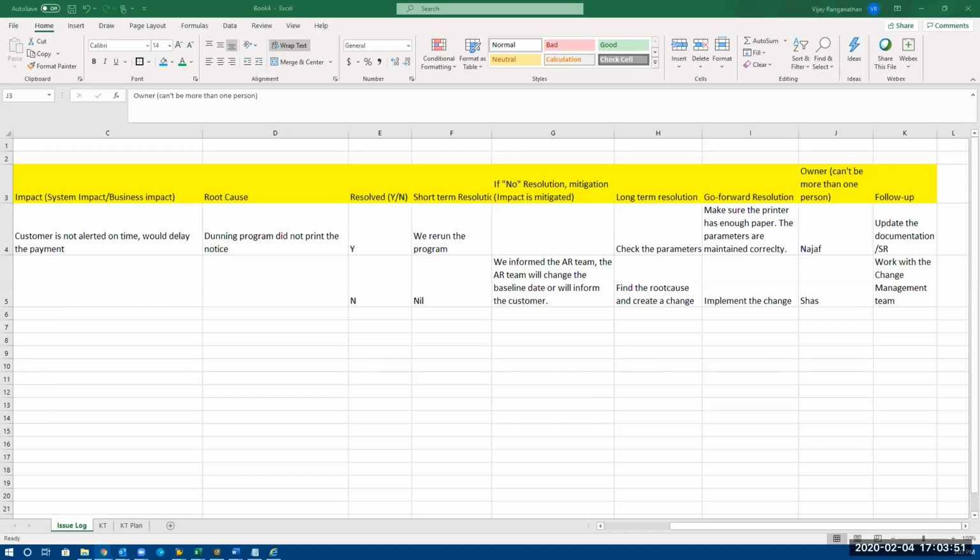I guess someone has to be responsible for the task, or accountable. Exactly, right? You can create accountability for 1 person. If you have 2 people, he would think somebody else is doing it, and the other thinks he would be doing it, right? So you have to make 1 person accountable. It cannot be a group, it cannot be a team. Even if you put a team there, it has to be a specific person from the team. Then the follow-up: you don't just assign responsibilities, you also follow up, making sure he's doing the job, right?